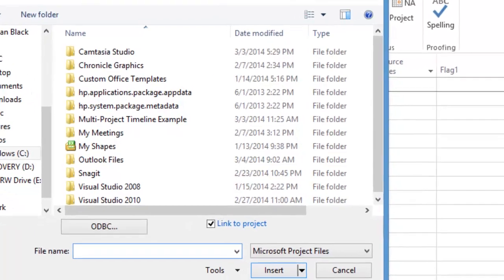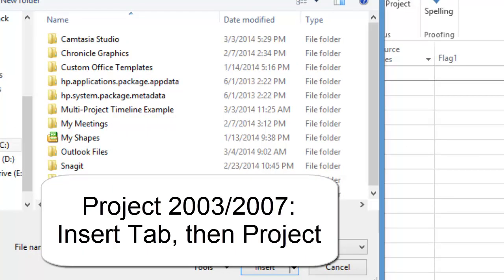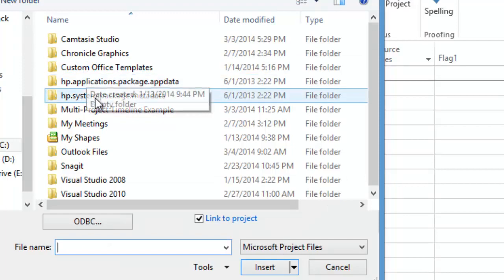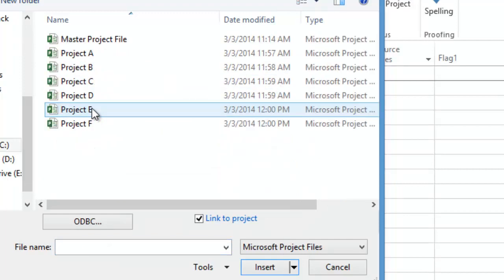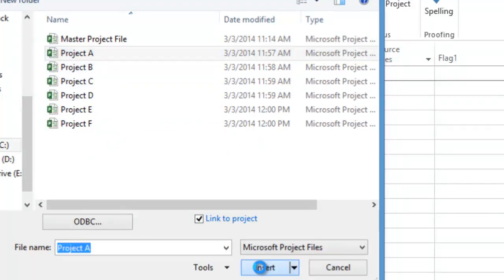In Project 2003 or 2007, you insert projects by clicking on the Insert tab, then clicking on Project. Either way, navigate to your individual project or subproject files and insert them.